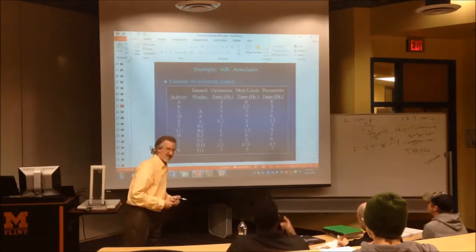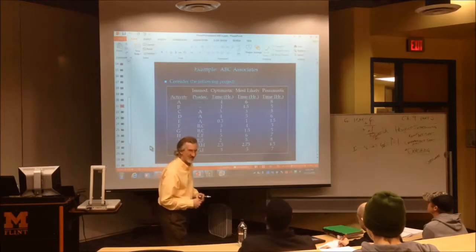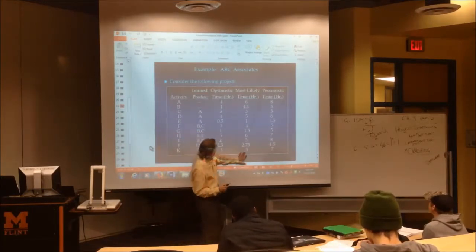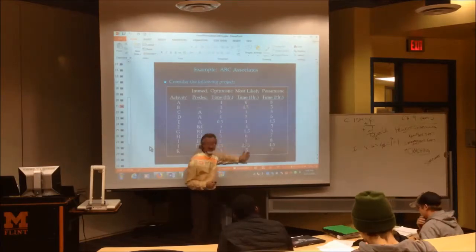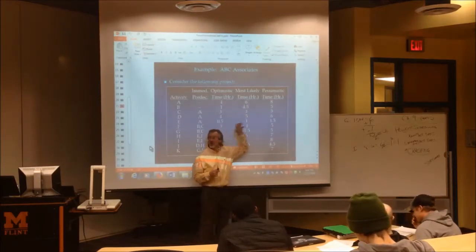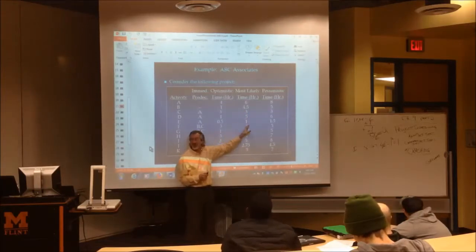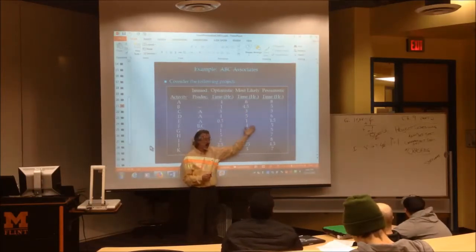Now, for the G, the 4, is that automatically always 4? It's constant. Every time, every one of these most likely times has to be multiplied by 4. It puts 4 times the weight of what is expected from all those meetings you had to have to come up with these times.